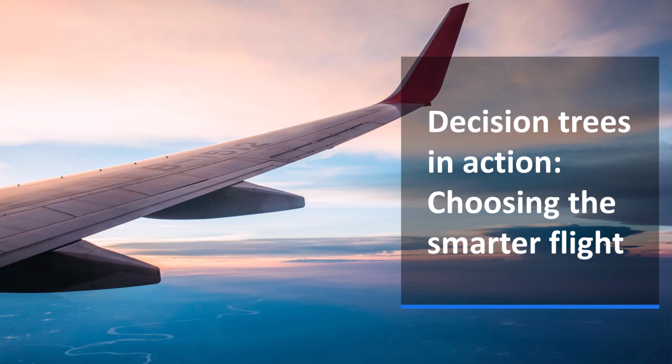Okay, hold on. Flight B looked way cheaper at €300, but its total expected cost, its EMV, is 1,500. While Flight A, which cost €900 upfront, has a lower total expected cost of 1,300. That's the core insight right there. The initial price isn't the deciding factor when risk is involved.